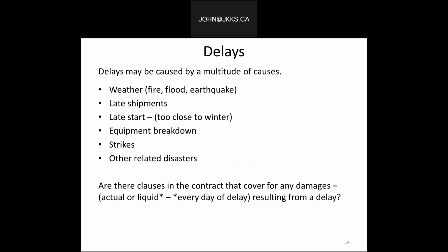There are several common reasons or causes for delays. Delays may be caused by a multitude of causes as listed here: weather, late shipment, late starts, equipment breakdown, strikes, or other related disasters. Again, in the contract, are there clauses that cover any damages, actual or liquidated? For example, with liquidated damages, every day of delay would be a certain amount of fee charged resulting from a delay.